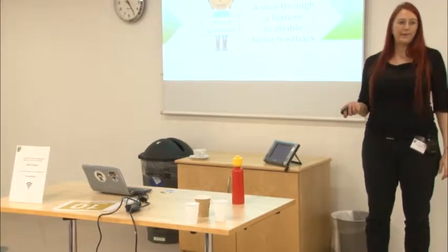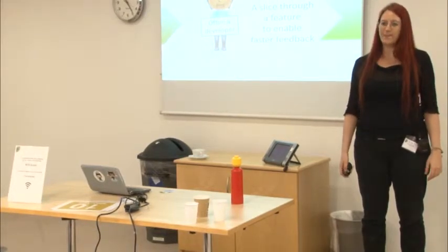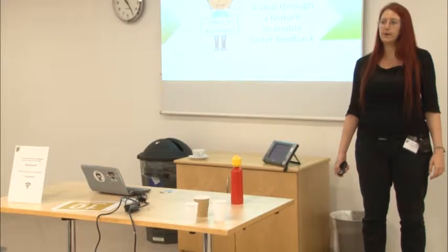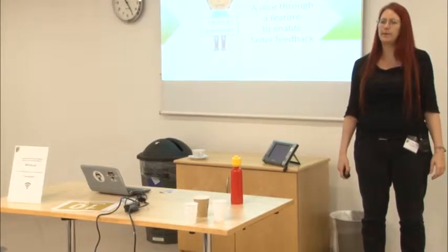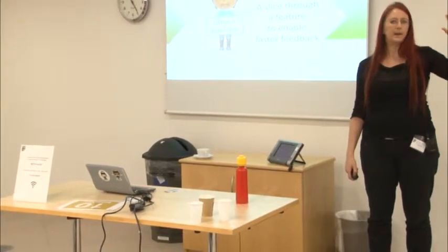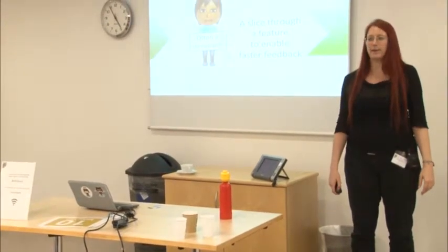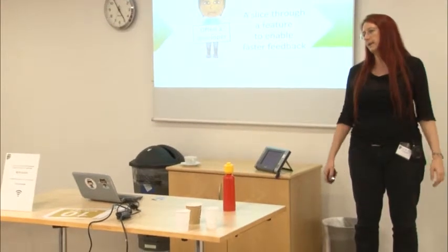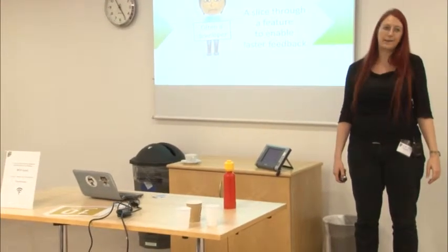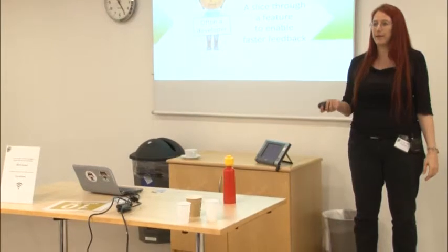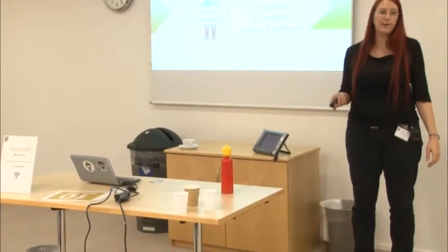A story is just a slice through a feature to get faster feedback. That's all it is. Those of you who are still working in Scrum teams, this is a great way to look at stories. You just want to get feedback within 2 weeks, and sometimes features are a bit too big to do that, so you slice through so you've got something to show to your stakeholders when they turn up. If you can get feedback faster than that, do it.